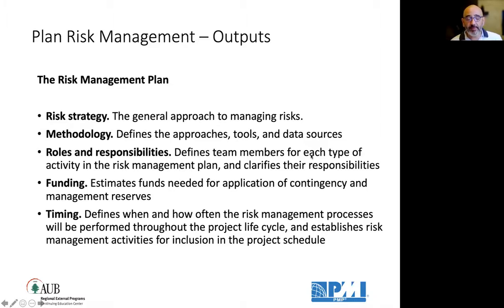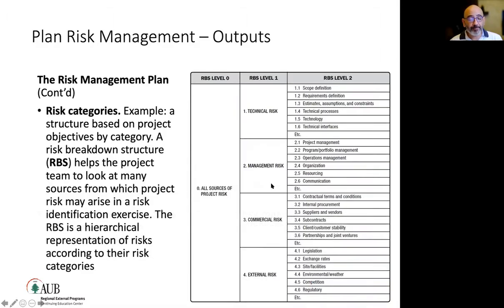There will also be roles and responsibilities, defining team members for each type of risk activity. There is funding, the estimated funds needed for the implementation of the contingency and management reserves. Then timings: when and how often the risk management processes should be carried out. When should we do quantitative risk assessment? When should we do qualitative risk assessment? What are the triggers that will necessitate reviewing the risk register, etc.